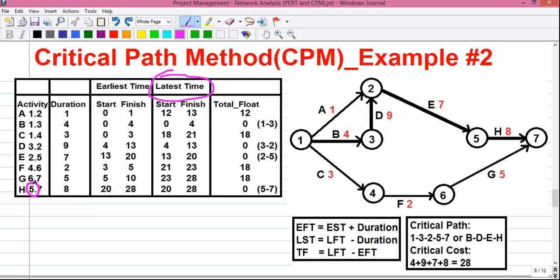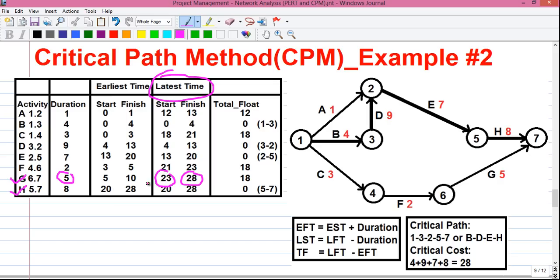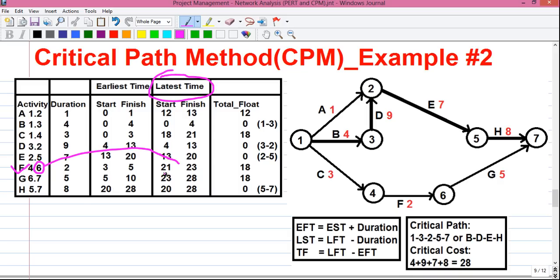Now I will tell you a shortcut technique. For activity H, the left side value is 5 and the right side value is 7, so activity H is done. Next, for activity G, the left side value is 6 and the right side value is 7. We already know the value for 7 is 28, so we simply write that. Then 28 minus 5 equals 23, which is the value for 6. Next, activity F: the right side value is 6, and we know the value for 6 is 23, so we write that. And 23 minus the duration 2 equals 21, which is the value for 4.